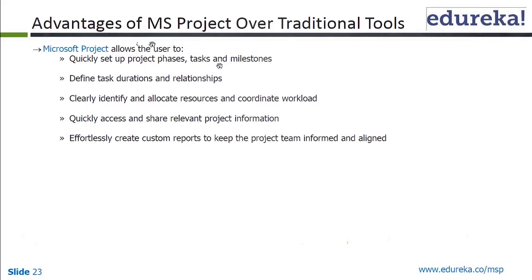You try to divide and subdivide, which is a tool and technique that you try to use, and come down to the level of the task. So tasks will be: you need to code for module 1, module 2, module 3, then you need to test module 1, module 2, module 3, you need to review modules 1, 2 and 3, and so on. So those all become tasks. And you can also set a milestone.